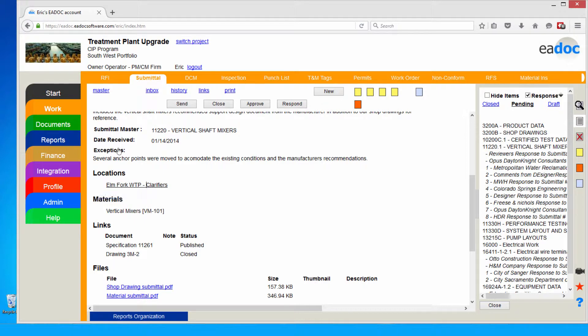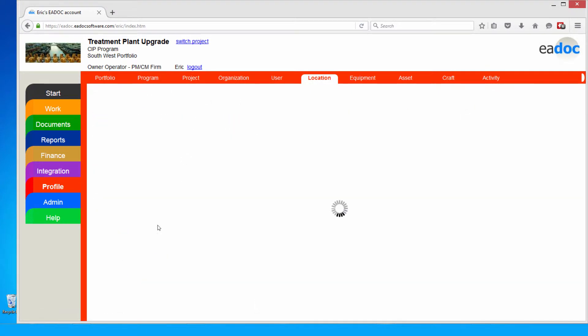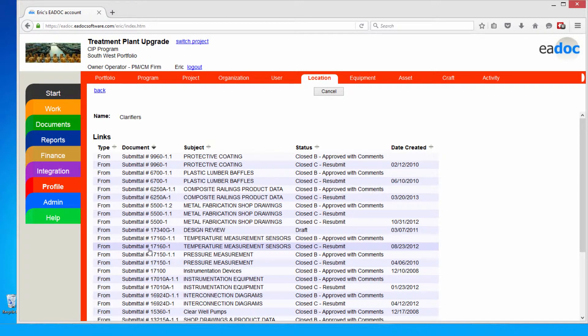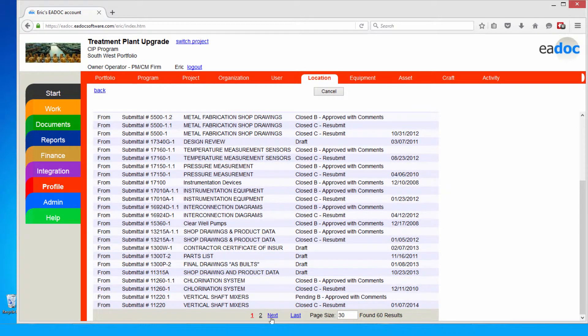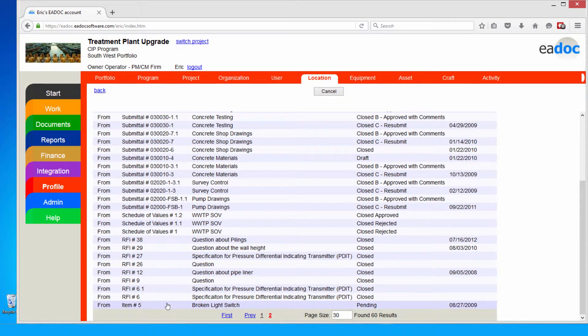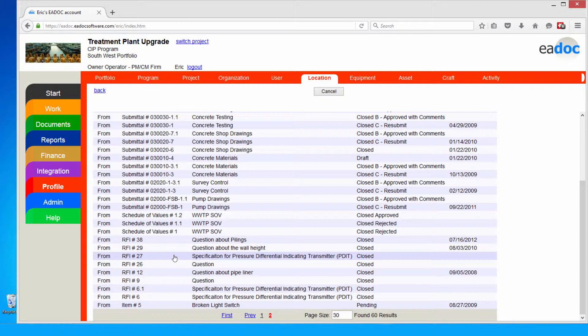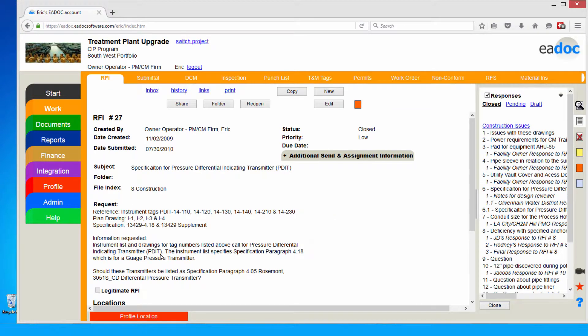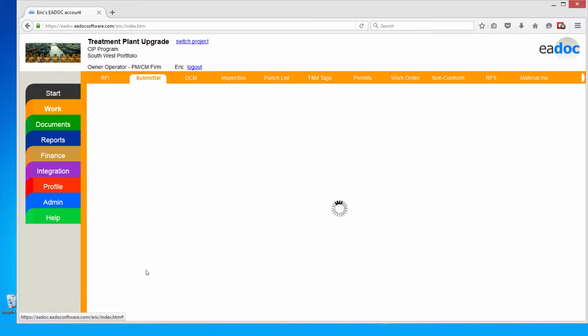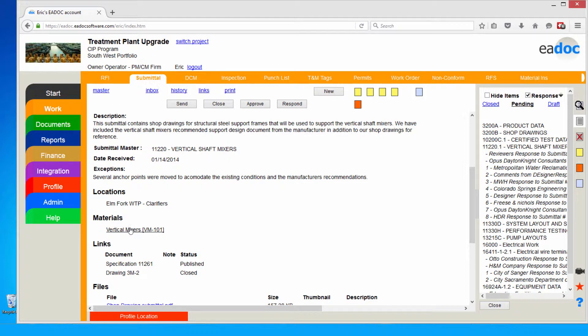For example, if I click on my clarifiers, I can go in and I can take a look at all the documents and communications. I can see all the submittals here tied to this particular location, my clarifiers, and I can see things like RFIs and punch list items. The great thing about our capital project management tool is it allows me to link anything to these locations. This is a huge benefit for my team in the field. An inspector or a superintendent can very easily bring up a list of all the documents and communication related to that particular piece of work they're about to do an inspection or work on. It's completely interactive. I can quickly drill down in these details and navigate around to the documents here in the system. We have those same capabilities with your major materials or assets, so I can asset tag everything. This is going to help me during the project, especially when it comes to startup and commissioning. It's also going to be a huge benefit to the owner of this facility, because I can turn in over all this asset tag data to their operations group, and then they can bring it into their asset or operations system.